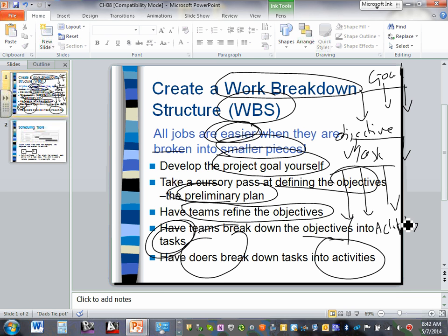For example: Adam lays out receptacles on the first floor, assigned one week. If he does not finish within that time, the project manager keeps track and expects the task to be complete to at least 90 percent satisfaction before a supervisor adds the final 10 percent. If he achieves only 50 percent, he has failed that task. As a project manager, if everyone else takes a week for a takeoff and one person takes two weeks, you need an explanation.